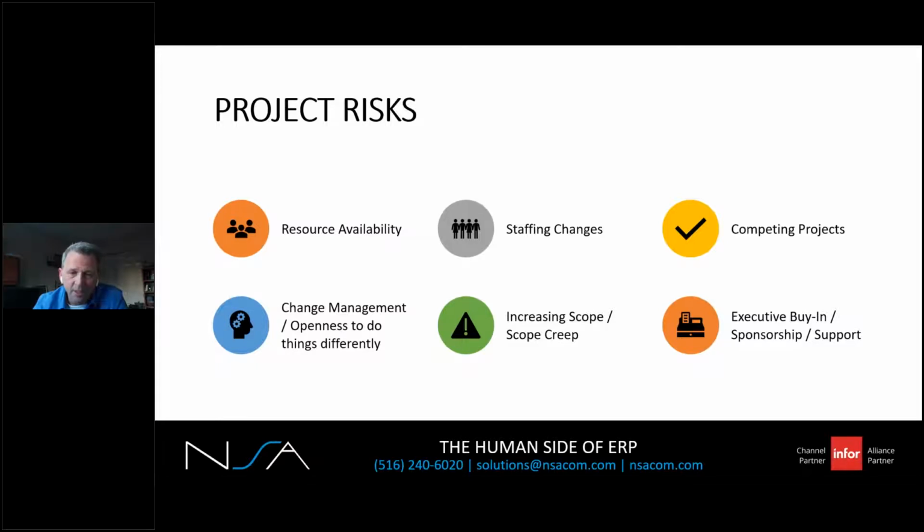Scope creep. This is where you add more and more tasks as you progress through the project. You'll want to deploy new features that come up, fix that old process. Remember, change takes time and effort, especially when it crosses multiple departments. Identify these. Be prepared to postpone to subsequent phases so it doesn't delay your project.